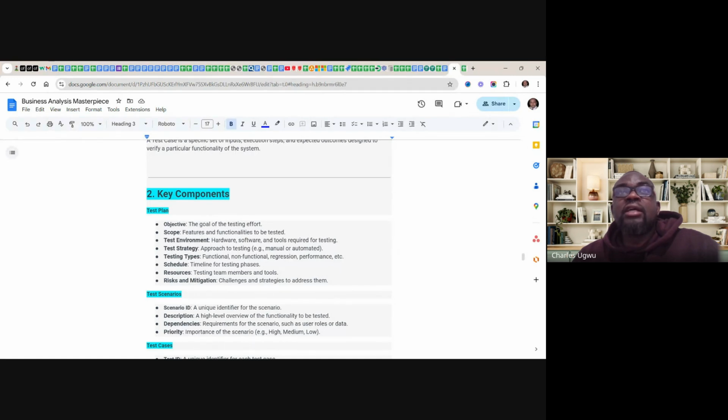If there are key changes in major people that are going to be testing, for instance, you've appointed a user in your office that is going to carry out the testing, you must have a backup. If that person is not available, all of a sudden he can be sick and couldn't carry out the testing, you can appoint the backup to come in and carry out the testing. So these are some of the risks and mitigations that can be addressed. So once you have this, you'll make sure that the testing is going to happen.